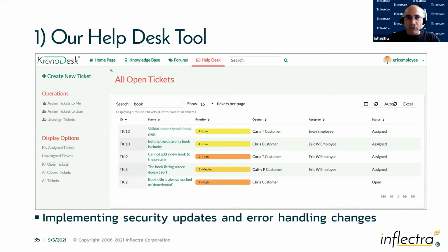But what we ended up finding was, unfortunately, to fix the application to work with these new, more stringent settings required a lot of page rewrites. And so we ended up having to rewrite 60 to 70% of the rest of the application because we had created side effects because of these security changes. And I think, from an architecture standpoint, when we did the test planning, we didn't fully appreciate how much time it was going to take to redo all these pages.